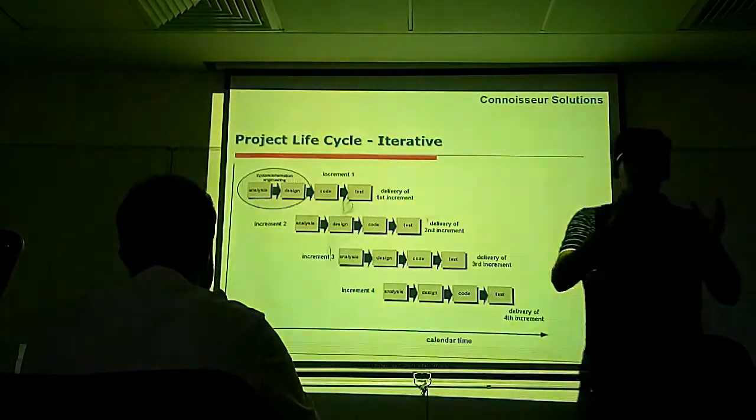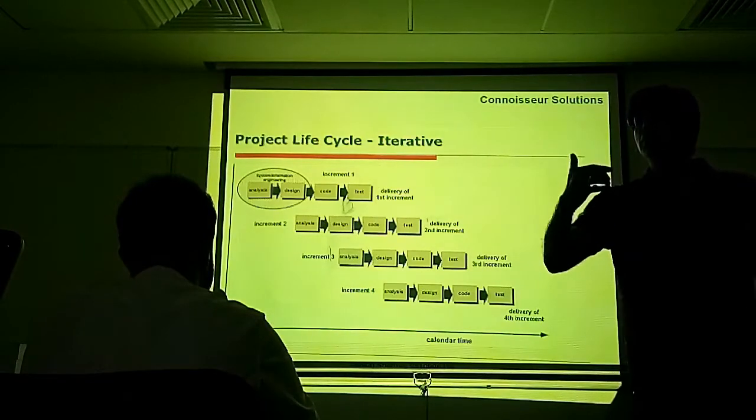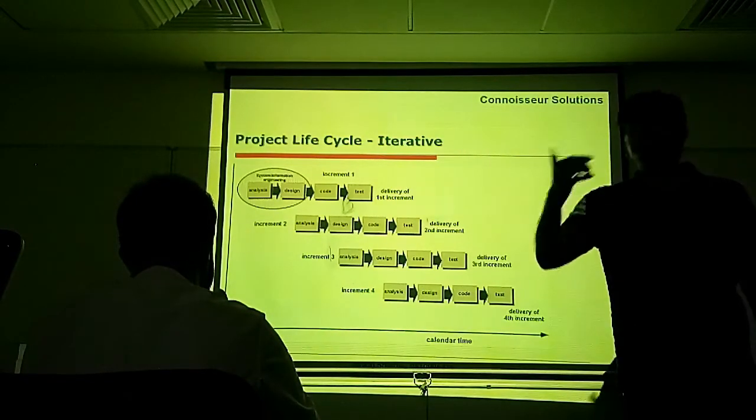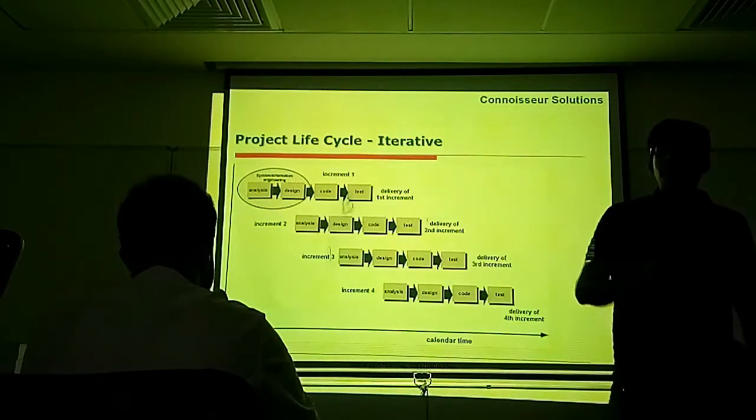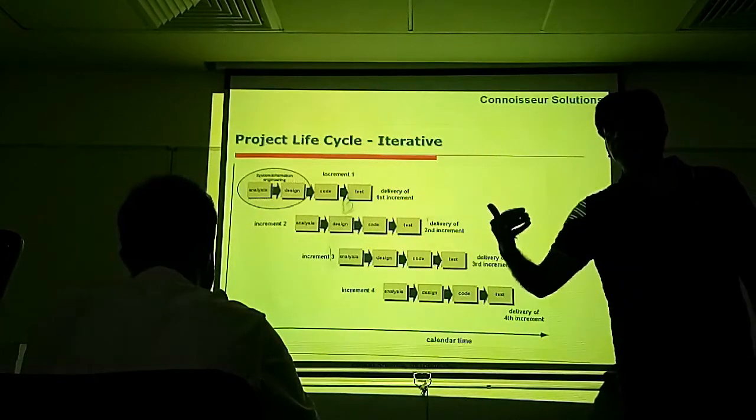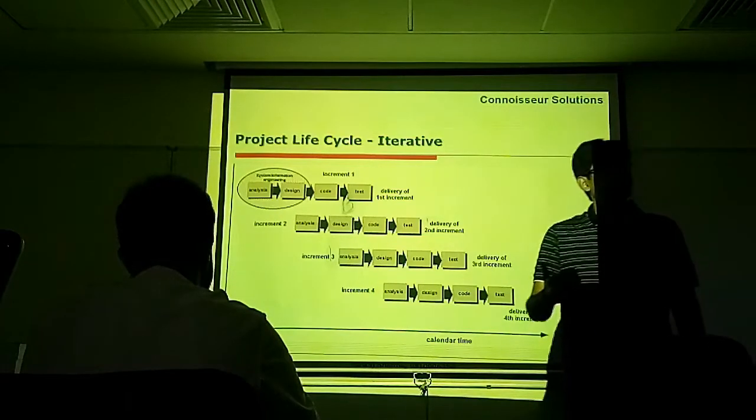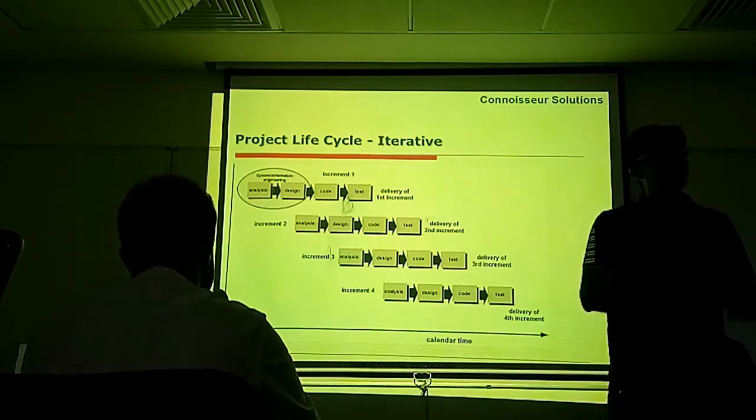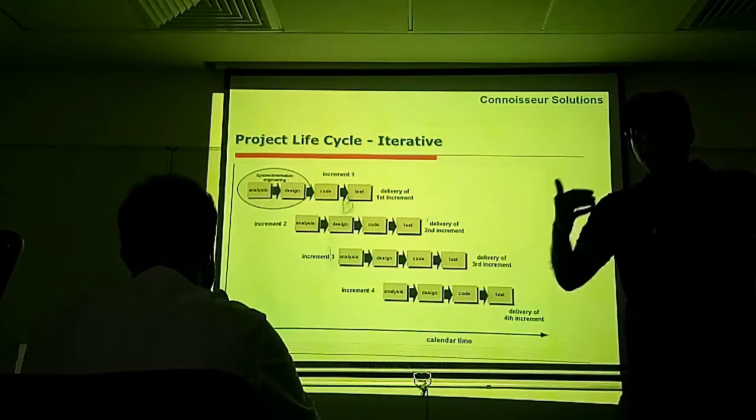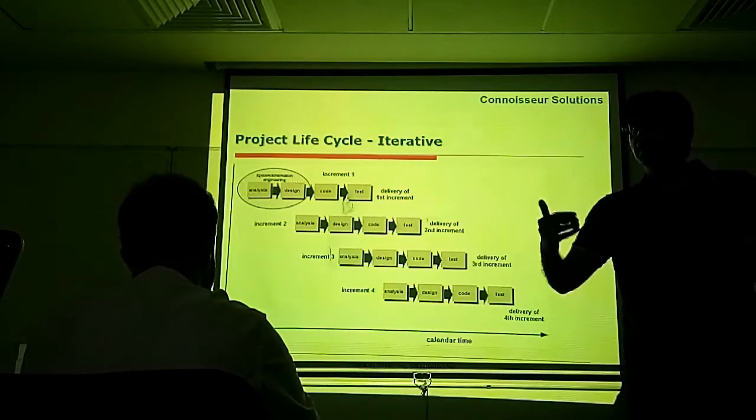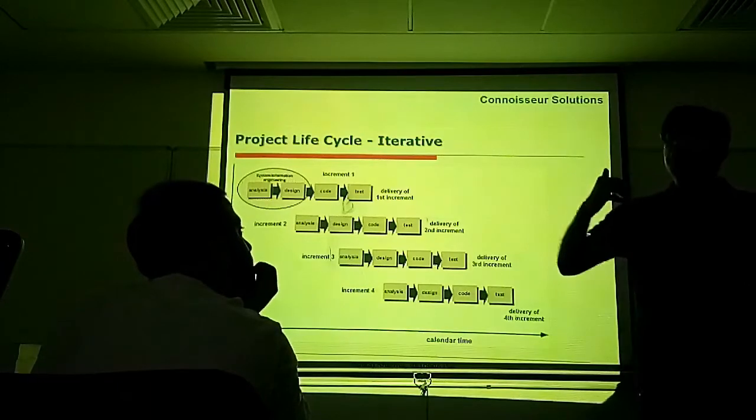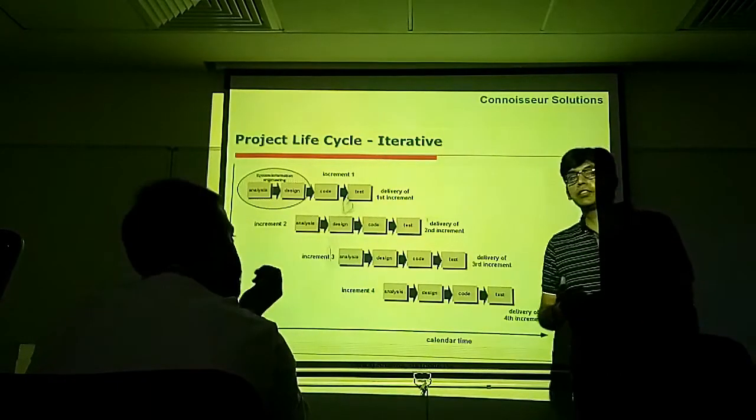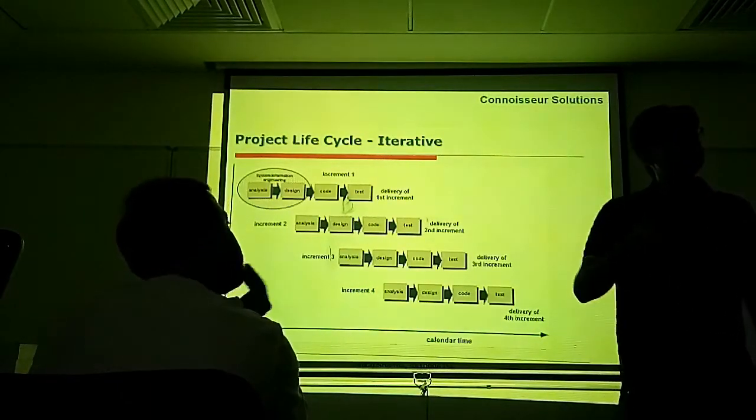Instead of launching the whole township in a single go, to mitigate your risks, you would like to deliver the project in a phased manner. In the first phase, you can deliver low-rise apartment. In the second phase, medium-rise. In the third phase, you can have a high-rise apartment.